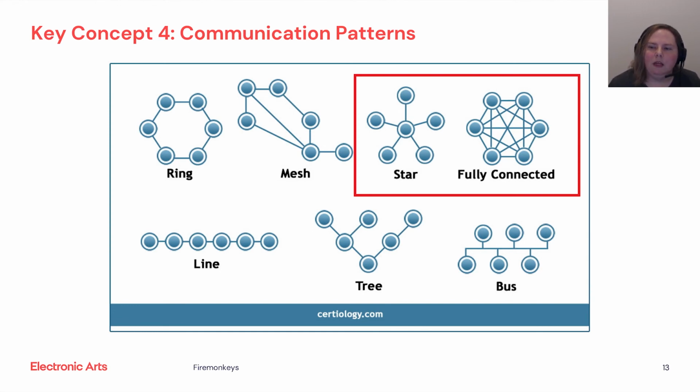For example, if I know that it takes about 3 weeks to deliver 3D assets, I can schedule an asset review meeting in 3 weeks. Then everyone knows their focus is going to be to get assets complete for the review meeting in 3 weeks' time, which can be a milestone and a key control in my pipeline. This forward activity creates bookends that control a section of my pipeline.